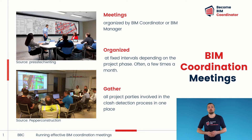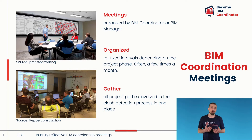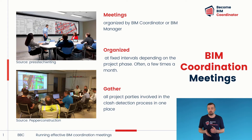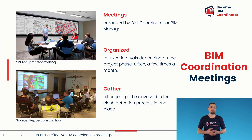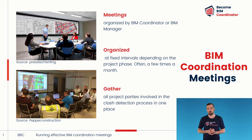A decision will then be made about which trade and individuals are responsible for resolving the issue. BIM coordination meetings are often organized at fixed intervals, maybe once a week or every two weeks. Their regularity really depends on how the project is progressing. During the initial stages, when models are not yet complete and design solutions are still being discussed, there will be a few BIM coordination meetings.